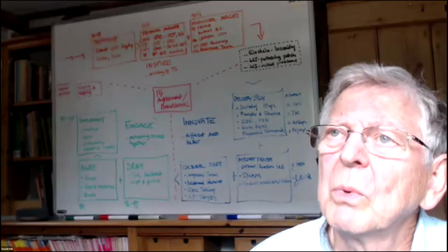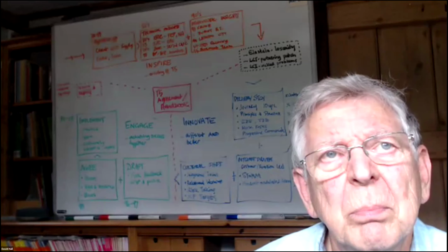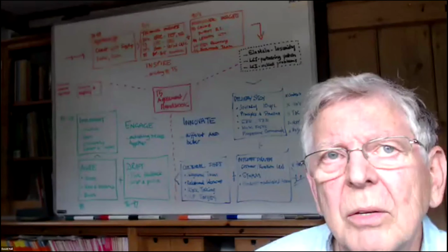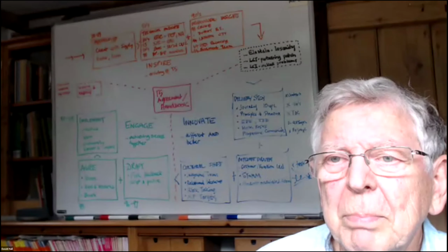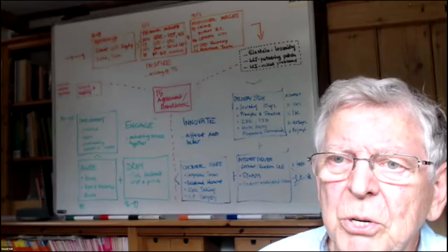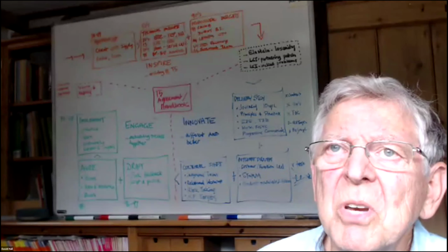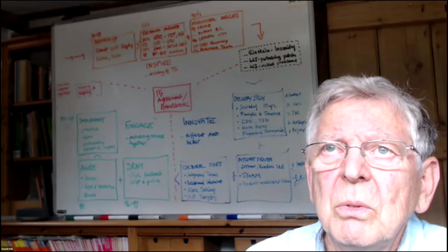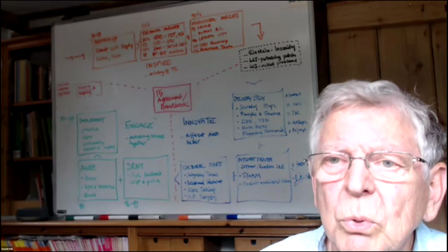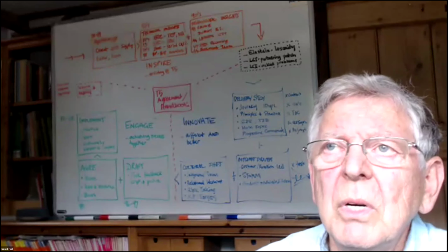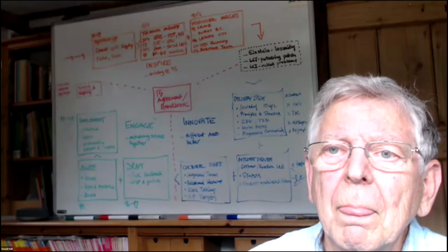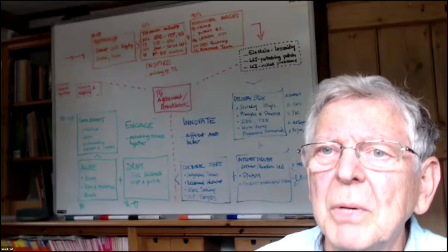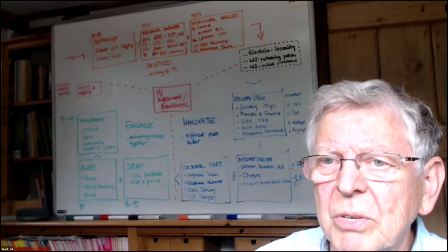Alongside that, I moved across to Bovis Lend Lease, Bovis Program Management, and there they had very successful serial relationships with clients, backed up by serial relationships with suppliers, the supply chain. Through these serial relationships, with Safeway for example, over 2 or 3 years, they reduced the build of a new local headquarters from 32 months to 16 months, still to the same specifications and the same quality, just by having the serial relationship and working at removing the waste and removing the risks.